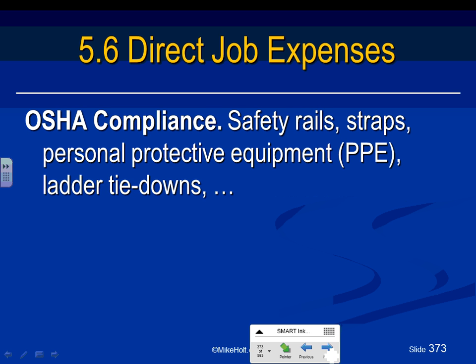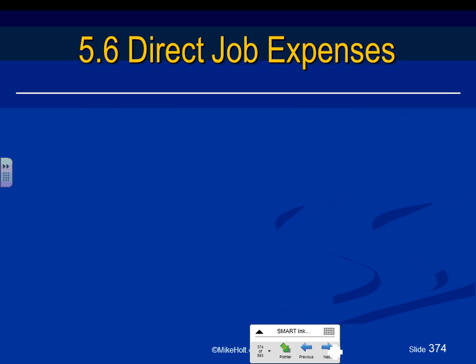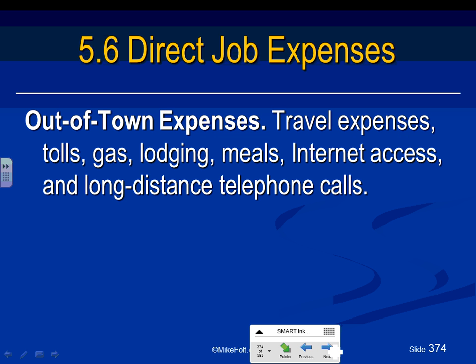OSHA compliance, safety, rails, straps, PPE, guys, ladder tie downs, all these things. OSHA will force you as a contractor to meet the safety standards. So you have to have more money allocated for meeting certain OSHA requirements. So these are things to keep in mind as a project manager. Again, you guys are project managers.